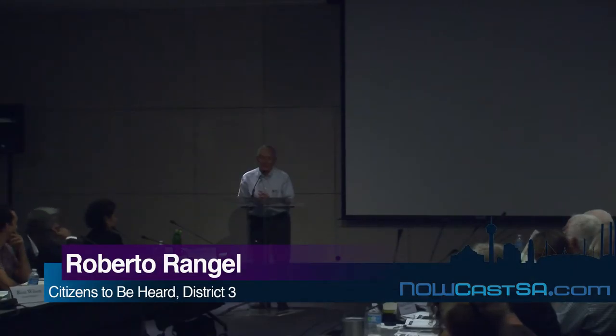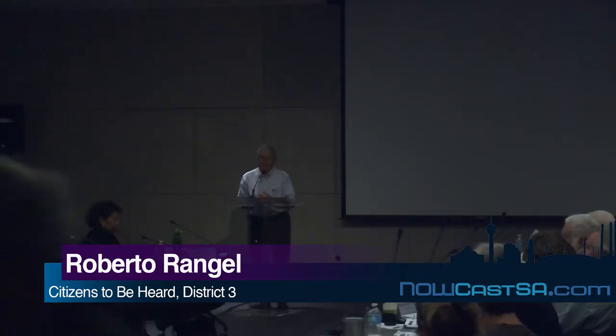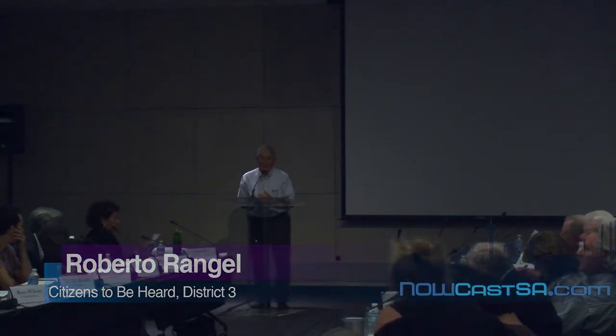My name is Roberto Anguiano, District 3, and I'm speaking on the YMCA. The last time I was here at the last meeting, I mentioned that we were able to secure about $2.5 million from the 2012 bond, and we were able to work with the YMCA, and we secured another $2.5 million. We have $5 million put together, and we proceeded to build Phase 1. Phase 1 is under construction right now, and it should be completed April next year, and we also now need to do Phase 2. And Phase 2 consists of a swimming pool and a play area. And we were here and we asked for $4.5 million to complete that project. So we would like to request that you consider that.